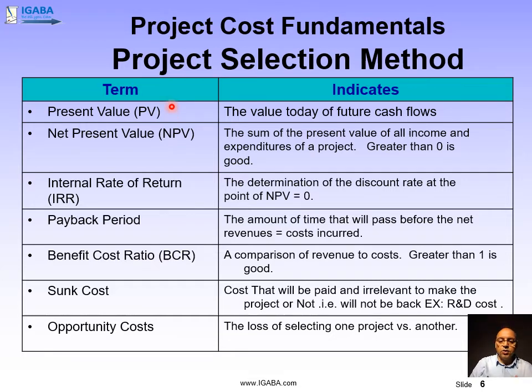Let's say you are working on a business case and some cash flow projections. Money that is expected to flow in or flow out in the future needs a certain reference point, let's say the present value. You take today as a reference point, and all the money that will either be spent or earned in the future needs to be represented in today's value. You need to account for things like inflation.